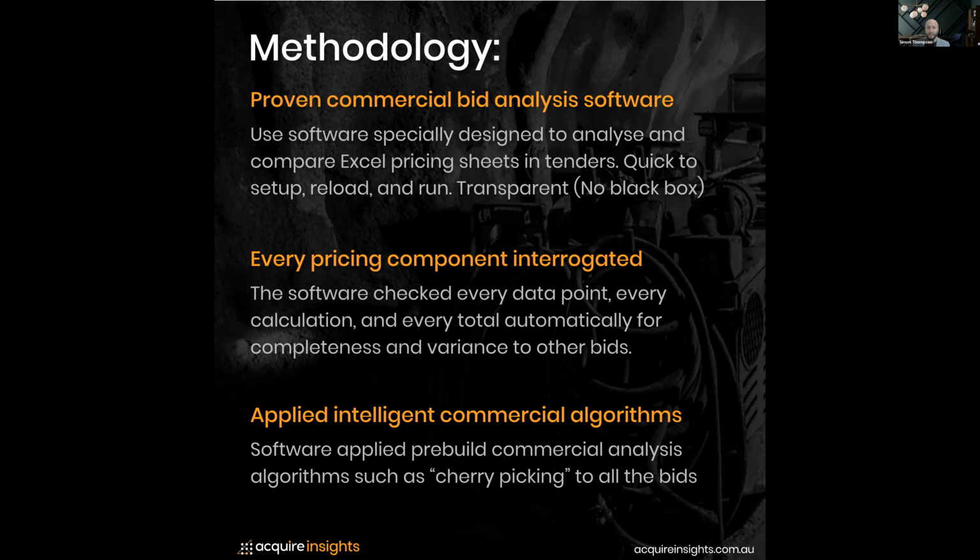So we needed something that would automatically check all those points, not just to make sure the data put in was in the ballpark, but also that all the data entry fields were actually complete.